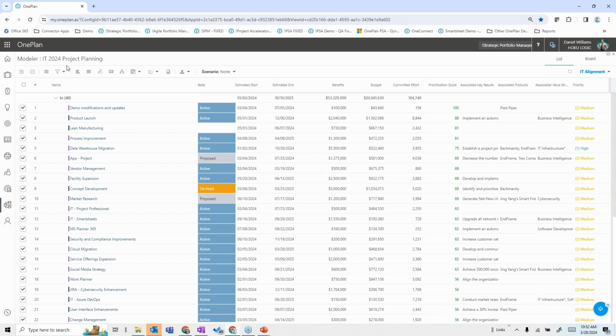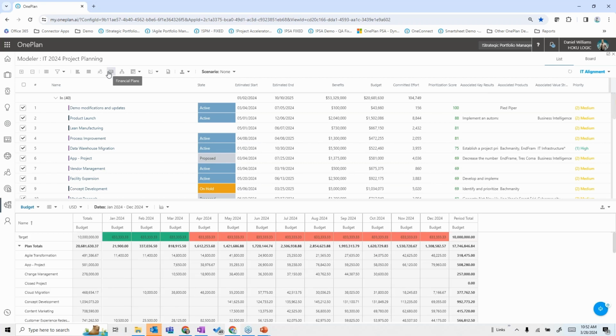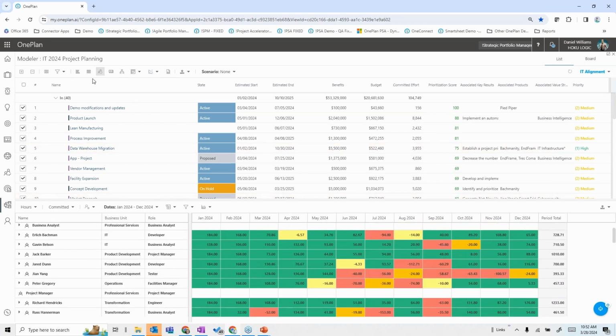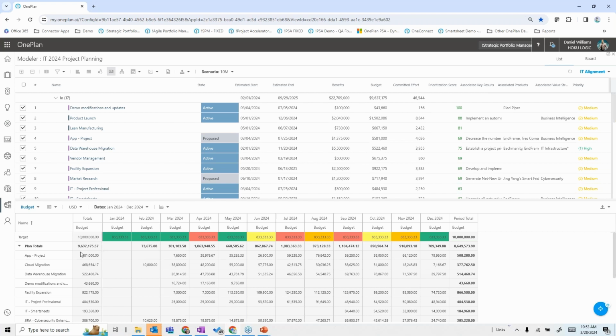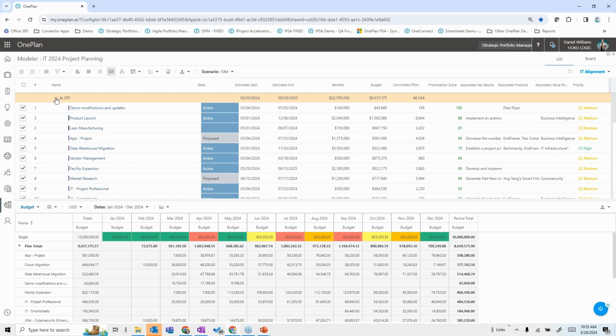And then to do those, I could take a look at this at any given point in time. I could look at my financial commitments that would be required to do this, across different periods of time. I can look at the resource requirements that are needed across these periods of time. And I can see to do all of those, I have significant over allocations in order to make that happen. And I can do different scenarios where I can say, let's say I want to go through a scenario where I want to evaluate selecting and deselecting projects or moving project timelines around, et cetera, such that to get within a $10 million budget, and let me go back to the financial side of this, I might have a certain selection of projects and or timing of those projects that would help me come into within that $10 million budget, which this does. But you can see I'm only doing 17 of those projects, and a number of them are now out of that scenario that we can't do.